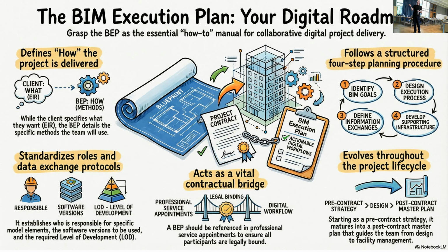So we have a project contract, and it's related to the BIM execution plan. This BIM execution plan is actually a contract, but it has all kinds of definitions. Like, as I said, we have a structural analysis team, a structural design team, maybe a separate energy consultant. Maybe we have different roles for different purposes. So we have roles and data exchange protocols, responsible people, different software that will be used, and requirements in terms of the LOD. Maybe we'll use different versions of software. So that's what it is about.